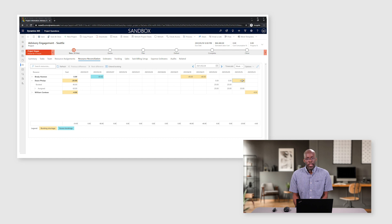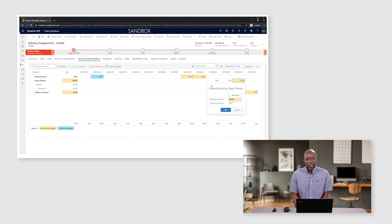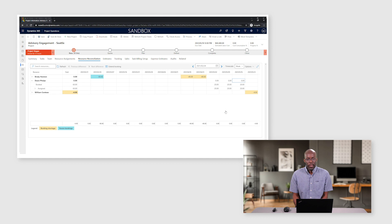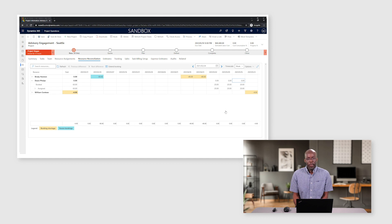And from the resource reconciliation grid, the project manager will have the ability to extend the resource's commitment to the project by extending their bookings.